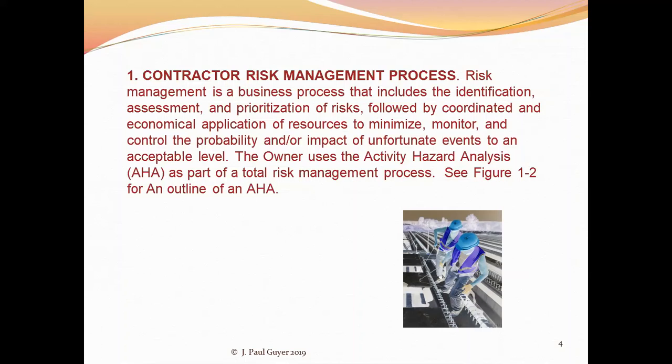And so step number one in a generic contractor risk management process is identification. What are the potential risks associated with this particular activity on this particular job? And this particular activity almost means the different subcontractors, because you've got one guy doing the plumbing work, guy or gal, and you've got somebody else doing the electrical work.